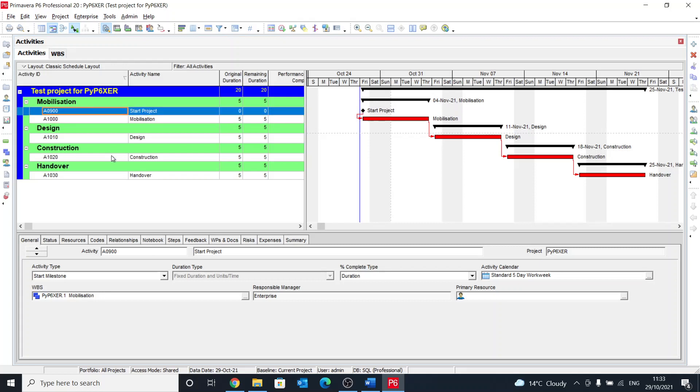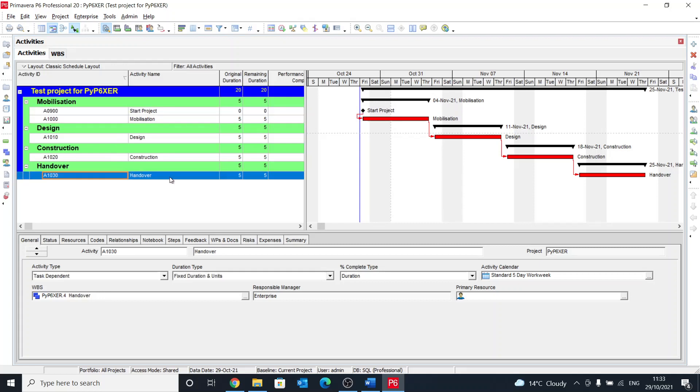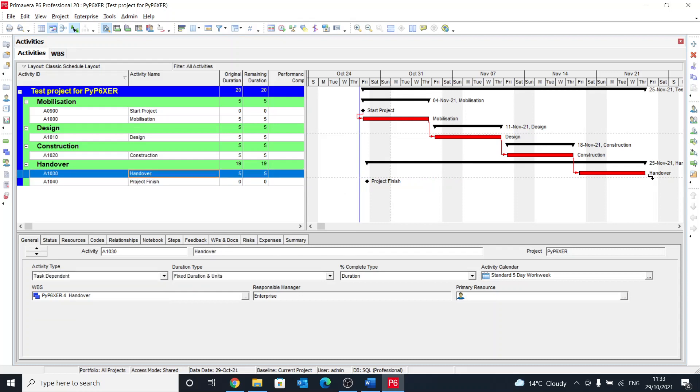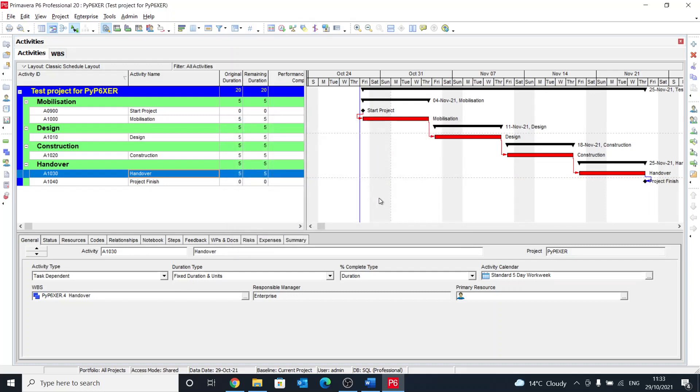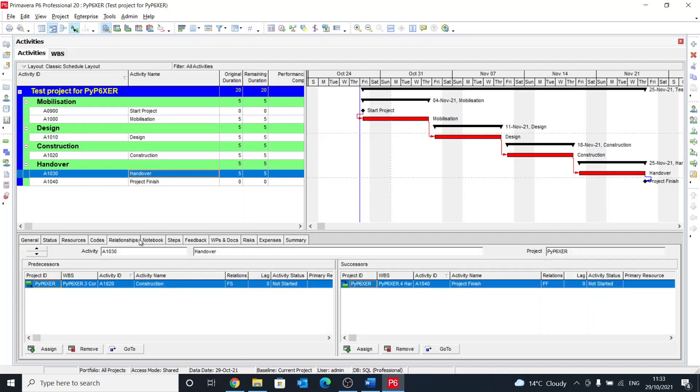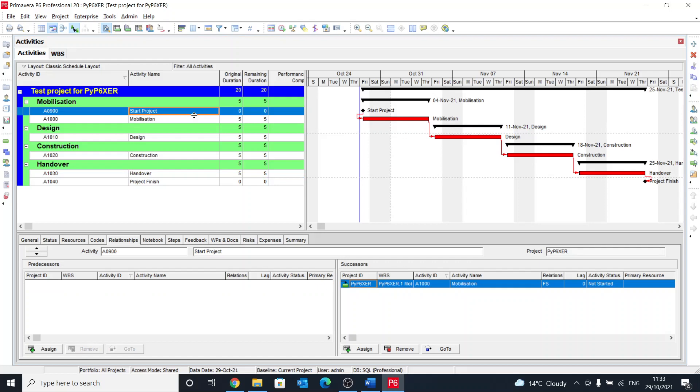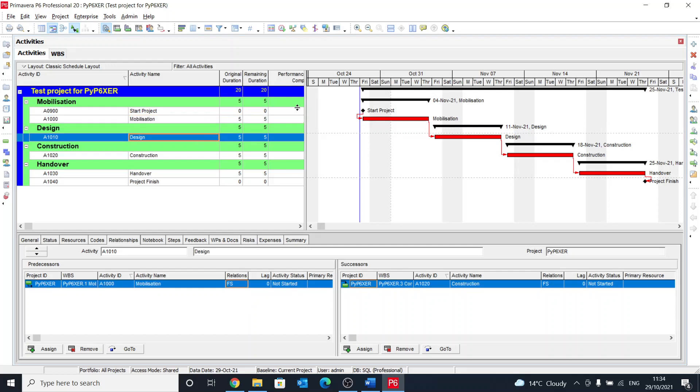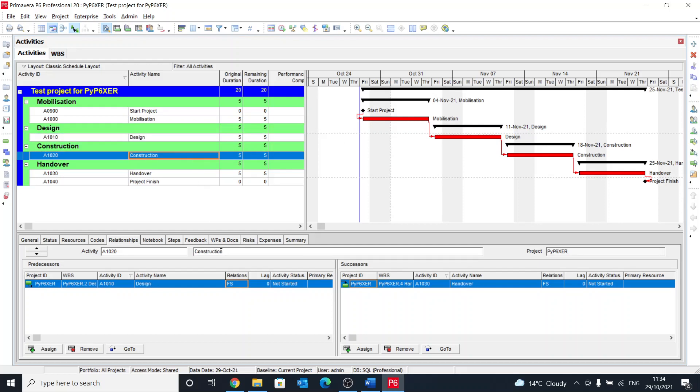And at the end we just say project finish, and this will be a finish milestone which will be linked to the finish of the handover. So the relationship here is finish-to-finish. The relationship there should be start-to-start with the predecessor. And then have finish-to-start. And we call this like we're doing overlapping between design and construction and make that overlap to be two days as a lag.